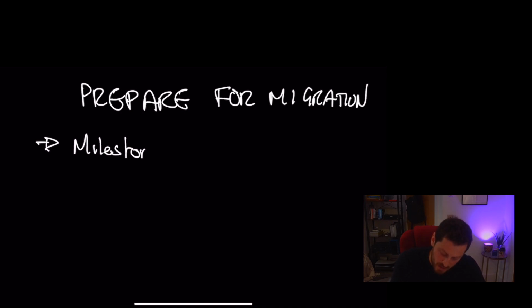You can call these what you like, but essentially they're much smaller deliverables. So you can have a deliverable to production at a quarterly level, you can have it at a sprintly level, whatever it is, but break it down into smaller chunks. Once you've got it broken down into smaller chunks, you can get more instant feedback on it. So, more feedback on it, a faster feedback loop.